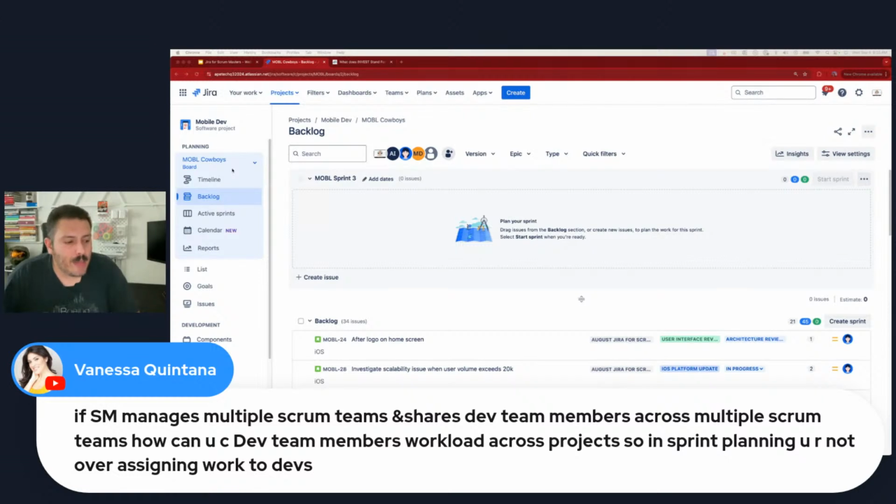So if you have the same person working on multiple projects, that's usually not a good indicator, because that individual has to go to 3 or 4 more different places to figure out their workload. My recommendation would be, you want to organize your work, specifically your Jira projects, to be team driven, not product driven, right? Because if they're team driven, then your team centralizes to one Jira project, and all of their resources, that particular individual's capacity, is just in one Jira project.